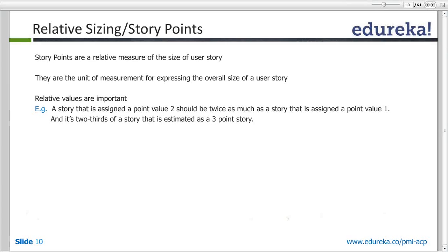So you compare the two of them. We take the less complex user story as point one, and we'll compare with others, right? Yeah. So you start with the user story which is the highest priority and then you move ahead. Whenever you start estimation, always start with something which is highest priority. Once you estimate those, you can use analogy, you can use disaggregation, whatever suits you.